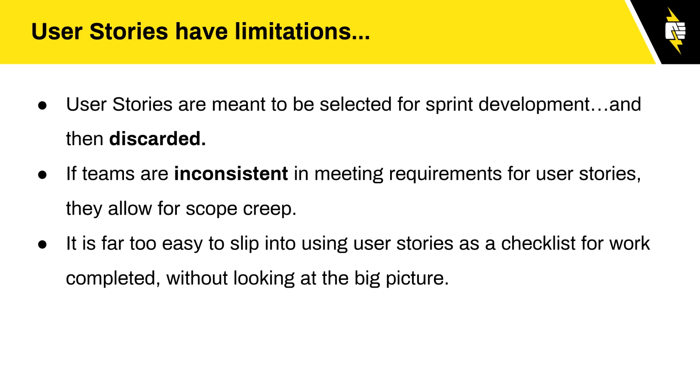Okay. So there's limitations there, though. They're meant to be selected for development and then discarded. They're not meant to be a permanent piece of documentation for the project. And a lot of times we do use that. Most of the shops that I've worked at, most of the teams I've worked with, have used that method. You put in your user stories, you do your work, you move it into the done, and that's then the documentation of the project, of the work that was done. Which isn't how they're meant to be used.